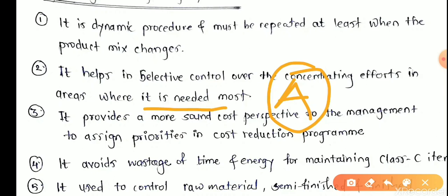If you visit some construction site, you see binding wires, nails, scaffolding, woods here and there, and their inventory is not maintained properly, but the cement bags and steel are maintained properly, stored properly, their checks, bills and inspections are maintained properly. Because of this concept of ABC analysis, because of their importance and values.